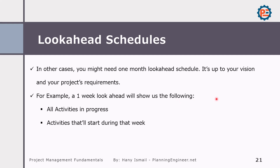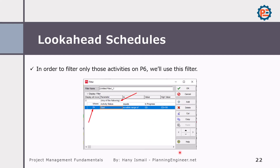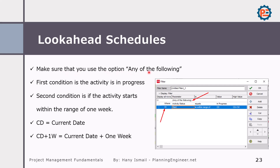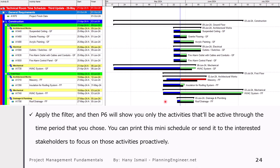Doing a look ahead schedule is very simple. Let's do the steps for a one-week look ahead schedule. We will show all in-progress activities and activities that will start during that week. From filters, we mainly create a look ahead schedule using filters. There is one ready-made filter you can find, or you can create your own. We will create one condition where the start is within a range of current date plus one week. CD means current date. Make sure to use the option 'Any of the following' because we are going to add another condition — activity status equals in-progress, or start is within range of current date plus one week.